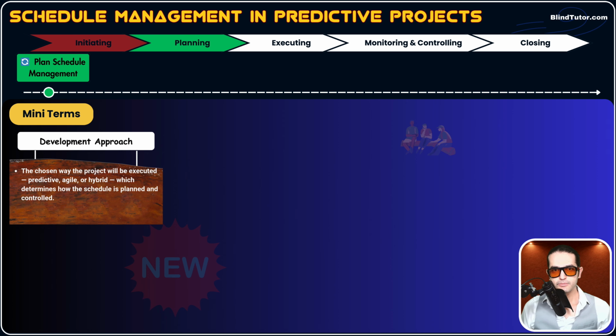That's why knowing our development approach is very important. And remember, guys, we don't use, for example, the predictive approach for all our projects. No, tailoring, okay? We need to see, is our requirements clear? If it's clear, go with predictive approach. If it's not, go with adaptive or hybrid approach. So many factors are important when selecting a development approach for your project.